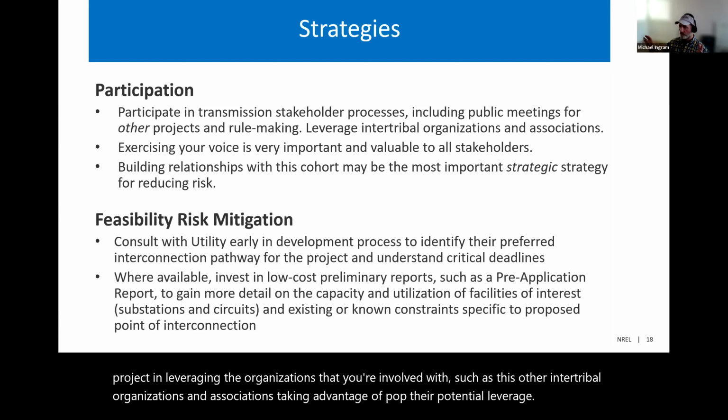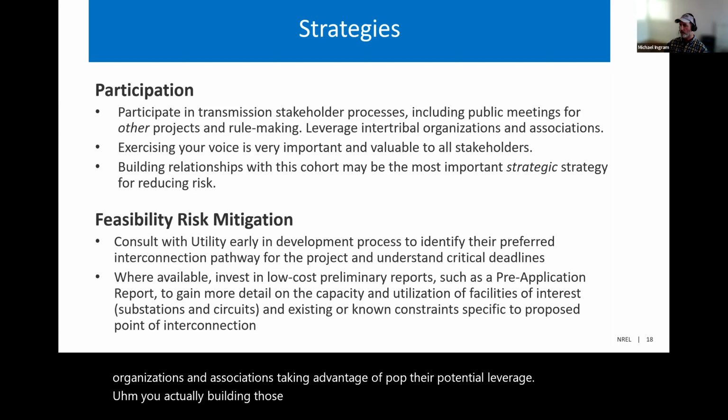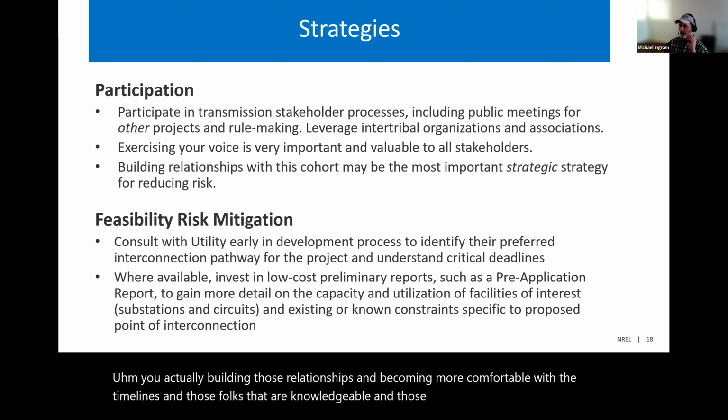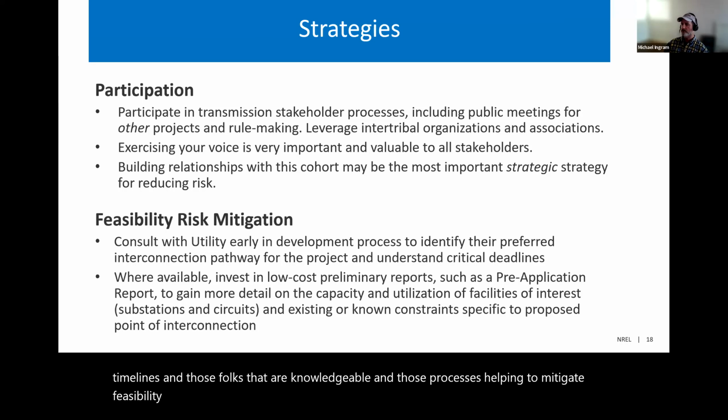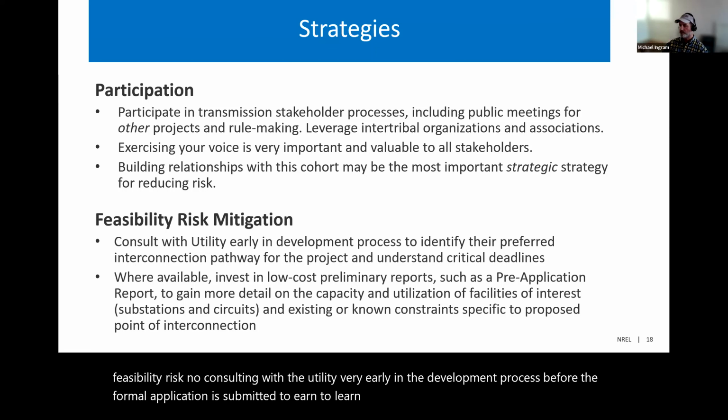Like I said, build those relationships and become more comfortable with the timelines and with the folks who are knowledgeable in those processes. To help mitigate feasibility risk, consult with the utility very early in the development process, before the formal application is submitted, to learn about preferred routes and pathways for projects, and what the associated deadlines are.